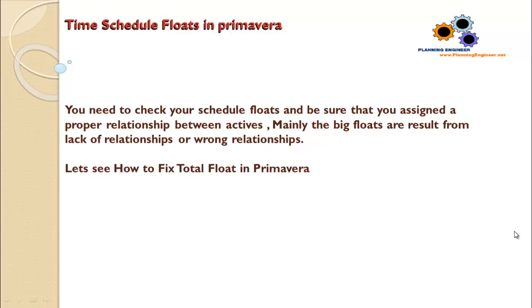Be sure that you assigned a proper relationship between activities. Mainly, the big floats are a result from lack of relationship or wrong relationships. So simply, let's go and see how to find and fix the wrong total floats in your schedule.